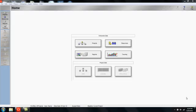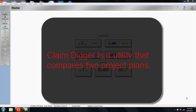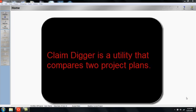Basically, ClaimDigger is a utility that compares two project plans. That could be a project plan after it's been updated compared to the project plan before it was updated, or it could represent a project plan compared to its baseline.